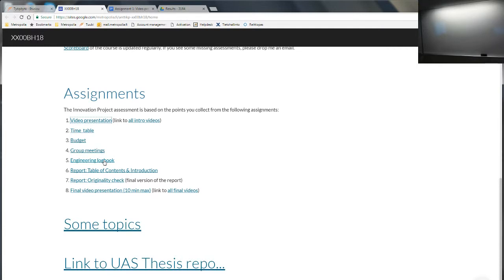Okay, the fourth was about the group meetings. So, timing of the assignments, my recommendation: first do the video presentation, and within, say, a week or two go through the timetable and budget. Then the group meetings, whenever you have those meetings. At the beginning of the project you would probably want to have meetings with your customer, for example, to make sure that your design parameters for your innovation are on the same page as your customer's needs.